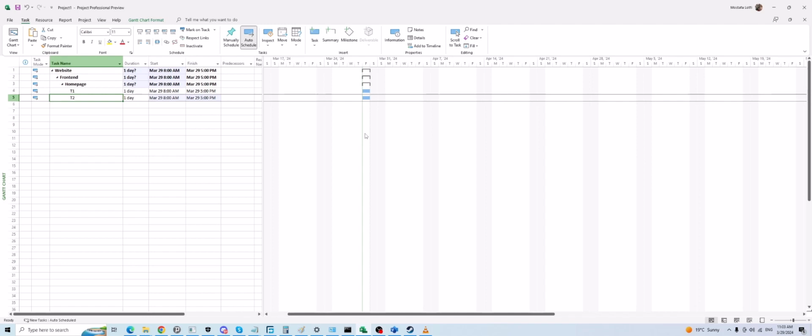As soon as person number one finishes the work, person number two can start working. But it doesn't mean that person should start working immediately. Maybe after 10 minutes, 20 minutes, 1 hour, start working